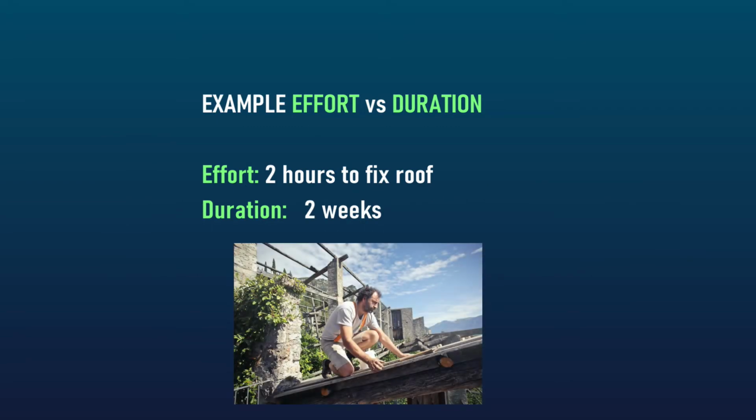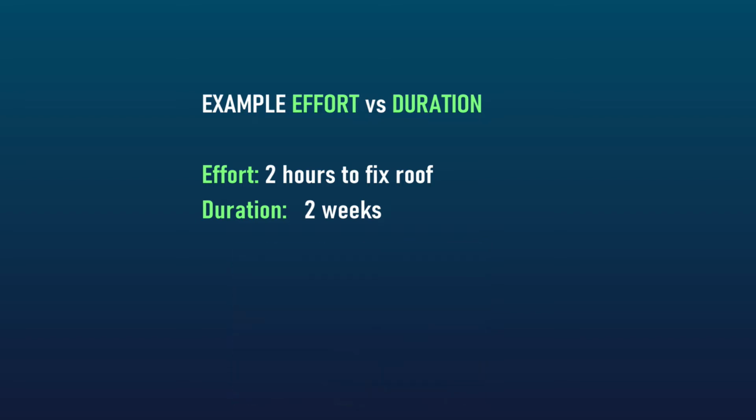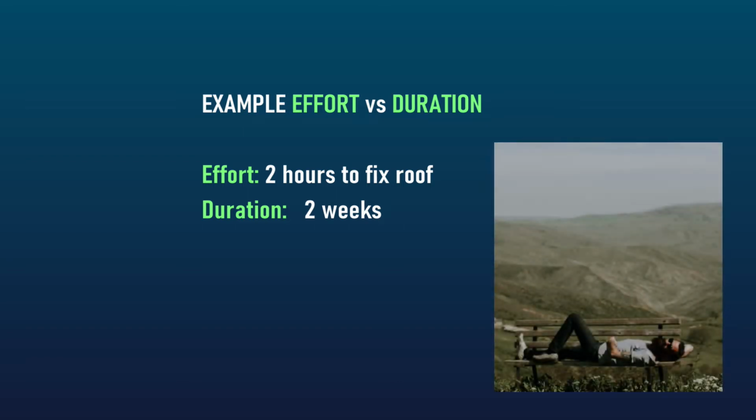It would take the builders 2 hours to fix my roof, but if you take into account all the going back and forth, it would take them 2 weeks, the duration, but they will be actually working on my roof for just 2 hours.